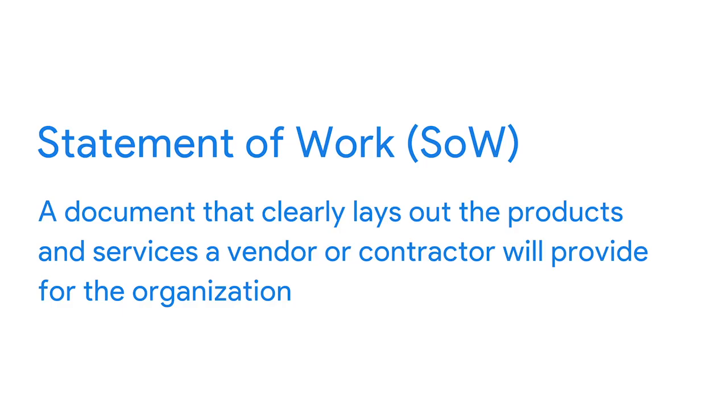Let's continue learning about the necessary documents required for a successful project. After you've sent a request for proposal to clients and you've selected the vendor, client or contractor you want to work with, you'll also send them an SOW, or a statement of work. A statement of work is a document that clearly lays out the products and services a vendor or contractor will